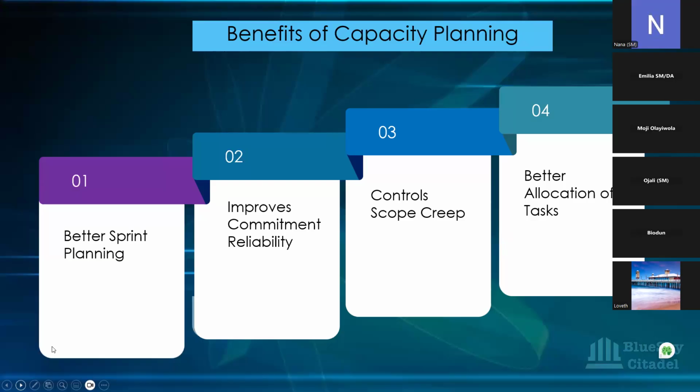This extra, if it takes priority over anything that is in the sprint, then we need to reduce whatever we've initially planned in order for us to accept this additional one you're bringing in. If it doesn't, because our capacity is low, can we do this in the next sprint, if it's not that urgent or critical? So it helps to negotiate and plan that, and to control it, because you know the capacity of the team, and you know that we're low in capacity, we might not be able to take it in. It helps to do that.